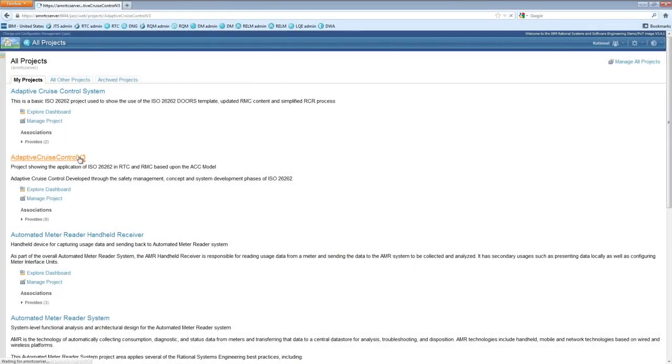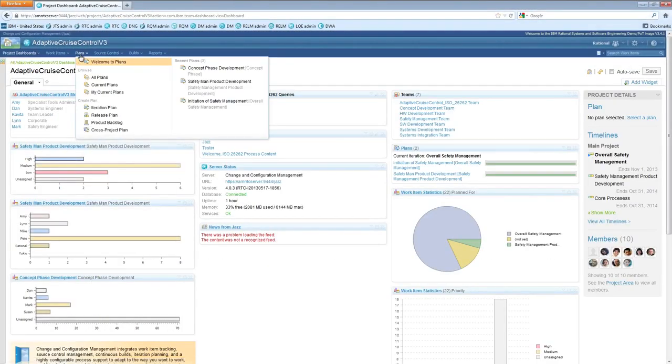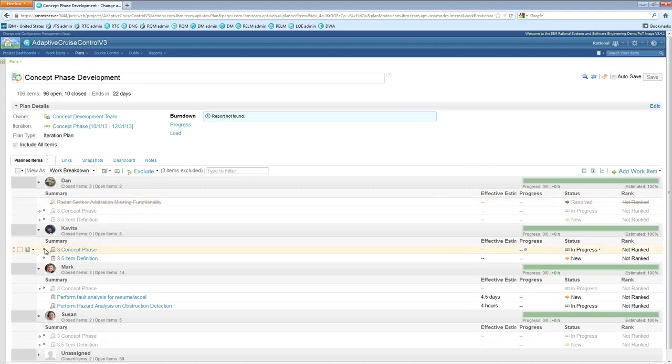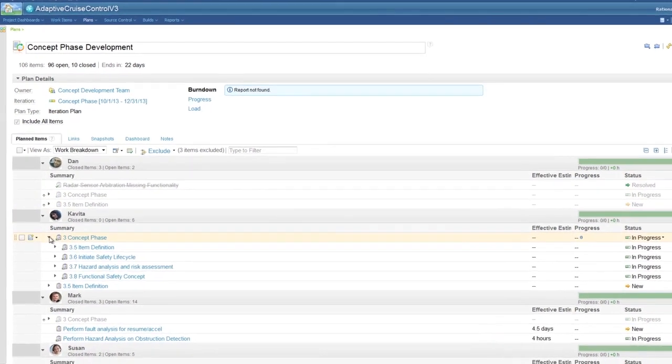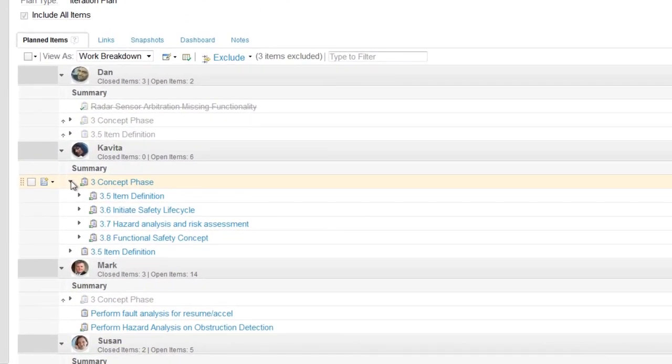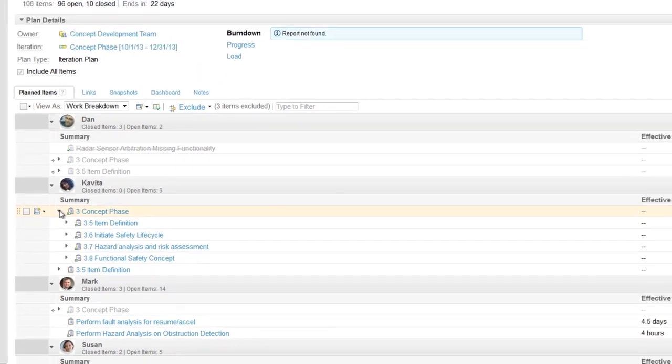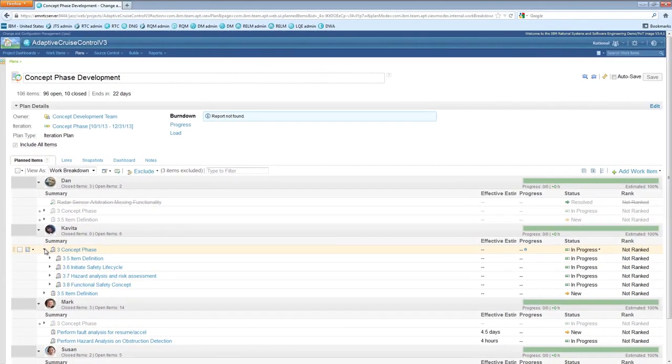Let's take a look at an adaptive cruise control project. In the Project Planning and Work Item Management application, you can see that there is a task assigned to one of the members of the concept development team. The task is directly aligned to Clause 3.7 of the concept development phase of ISO 26262, perform hazard analysis and risk assessment. The task is to identify potential failure modes and faults that could occur, and from this information, identify the safety goals and assign the Automotive Safety Integrity Levels, or ASILs.